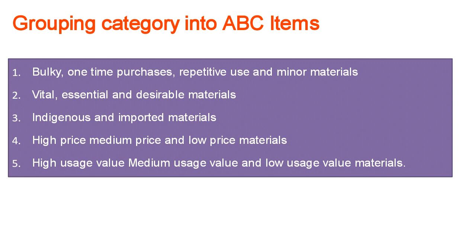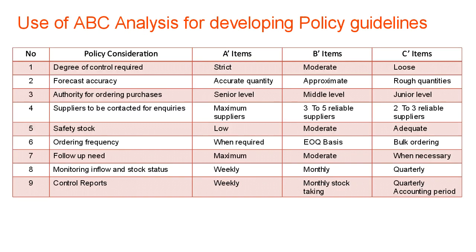Now high usage. Based on the usage also you can classify them, like high usage, medium usage, etc. I think see, for equipment, construction equipment and all, some of the equipment will be of very high usage, whereas some equipment will be used only for some specific tasks. So in such cases, when we have this category, it will help us to make some managerial decision of buying or renting, that we have seen in that equipment topic.